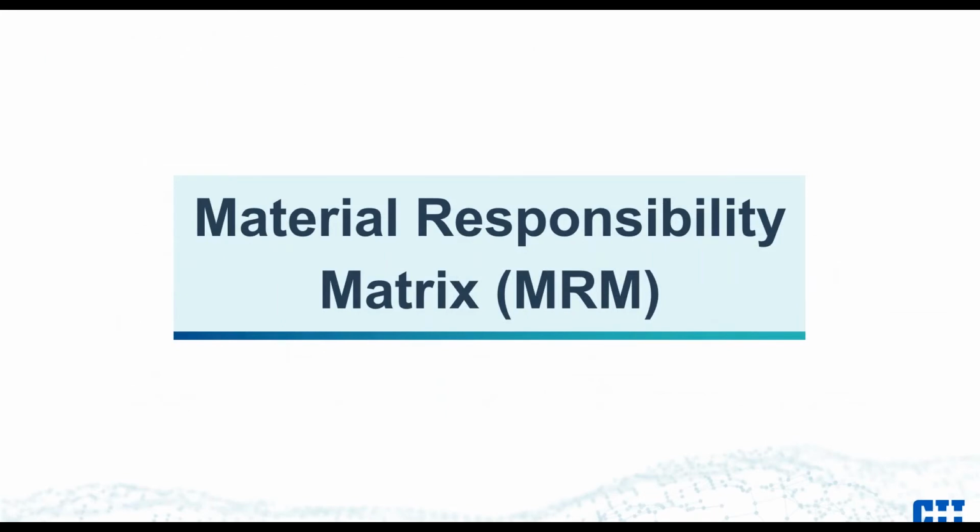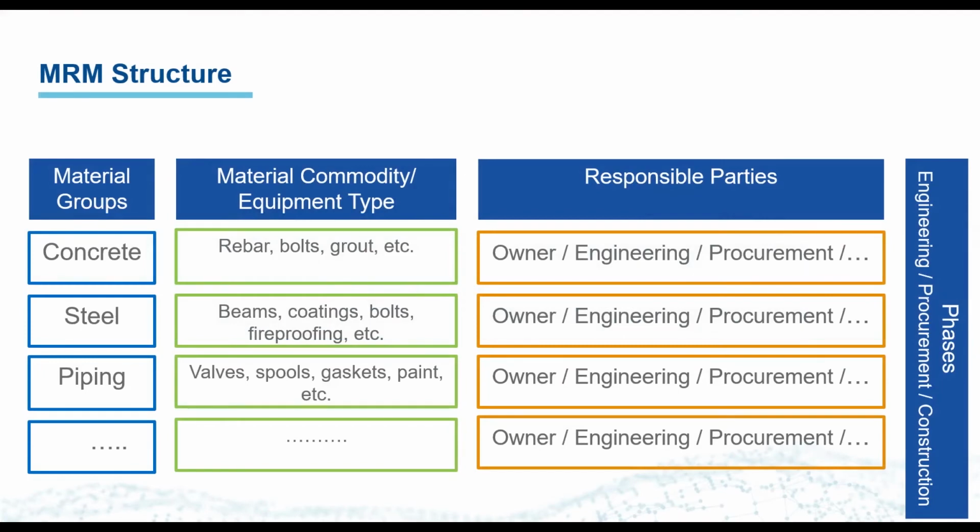So the material responsibility matrix was another bit of IP donated by ConstructX for this particular project. And what the materials responsibility matrix does, in the form that's presented here with this team, is allow a set of project managers to clearly identify the materials stakeholders for a project. If you go to the next slide, in the categories of all materials or commodities. And what it does further, as a responsibility matrix in a RACI style tool, is allow you to identify who's accountable, who's responsible, who is going to just be communicated to or be asked to coordinate or communicate about the particular digital thread or materials or commodity in question, and also identify that critical piece of timing and responsibility as it relates to that material or that commodity.